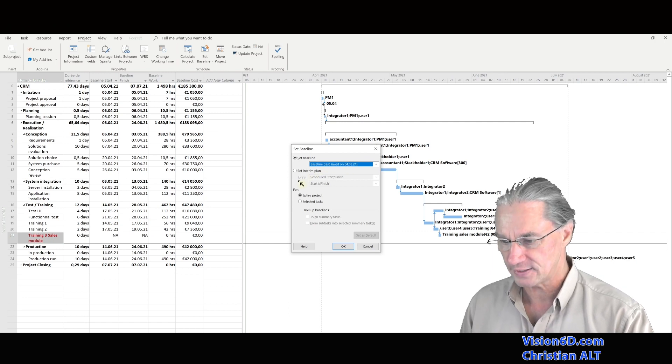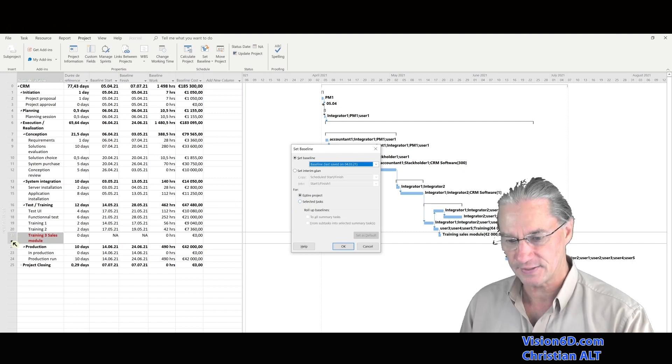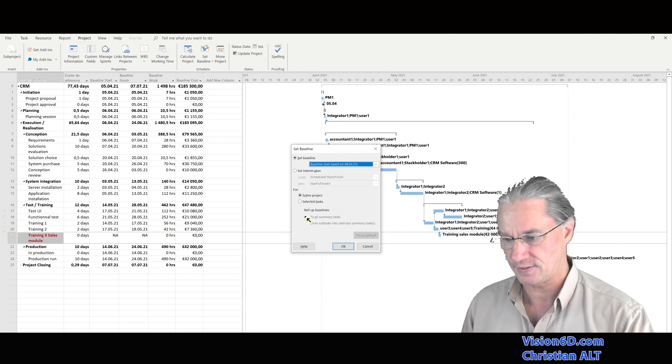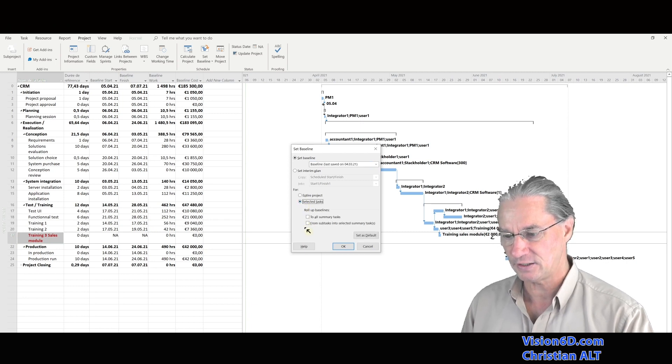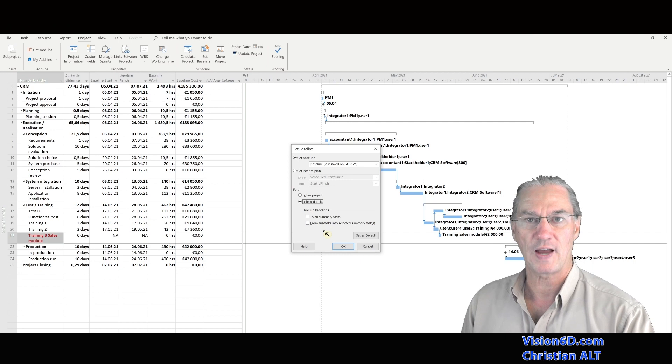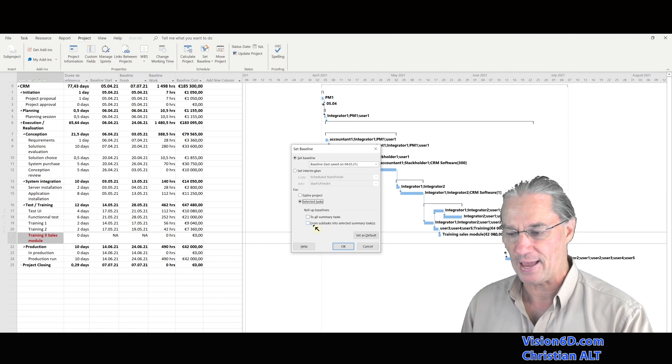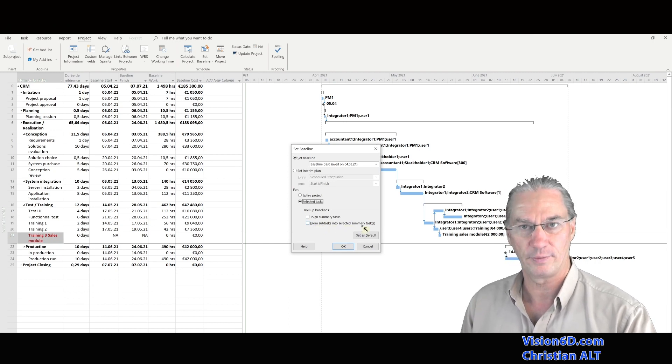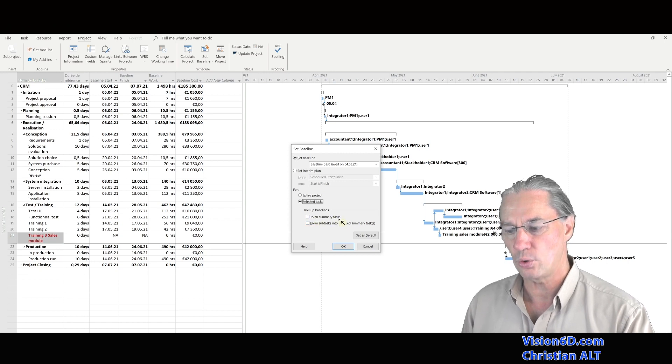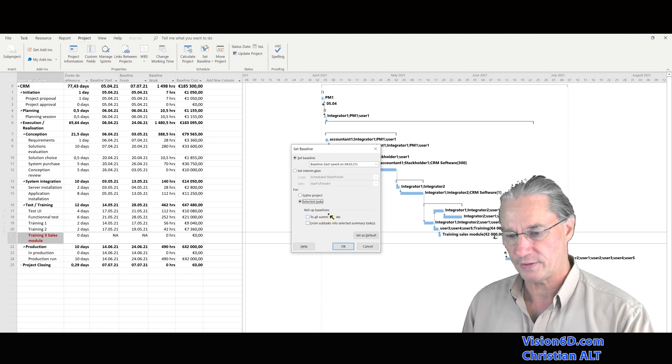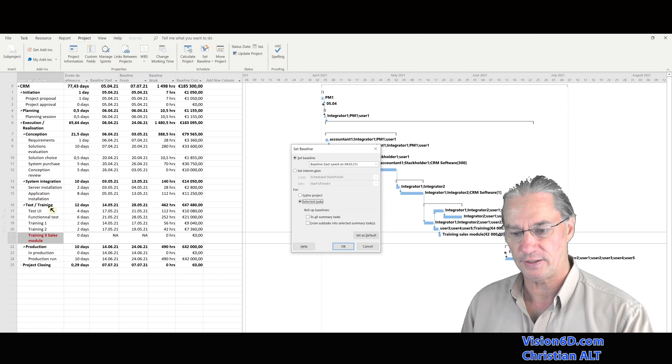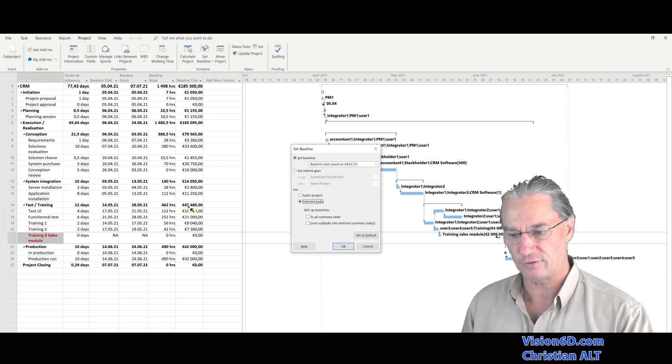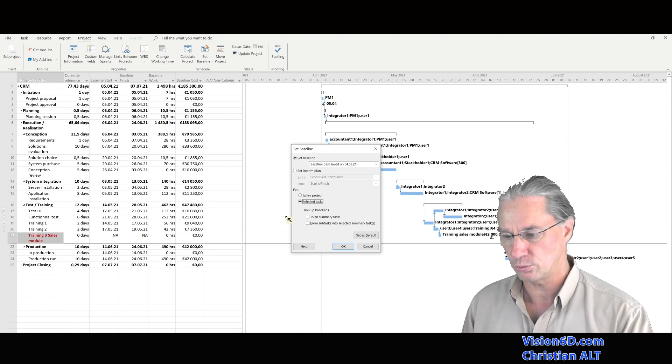And what I want to do is to add a certain task into that baseline. For that, I go here down, and I'm saying selected tasks, and make sure that here the task is selected. And I say selected tasks. And now we have two options: how it's going to sum up in summary tasks. We can say either we just want subtasks to have this, or we want it to all summary tasks. If you want to check this, you can see here the summary task, which is entitled test training, is actually at 47,480 euro.